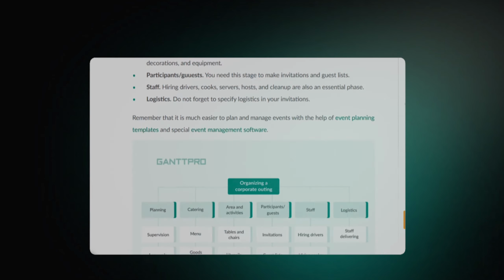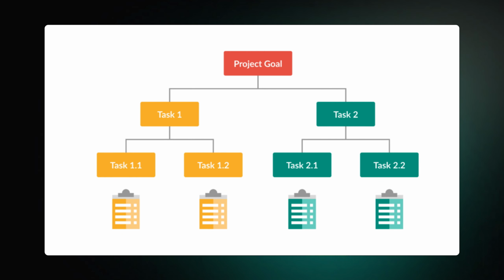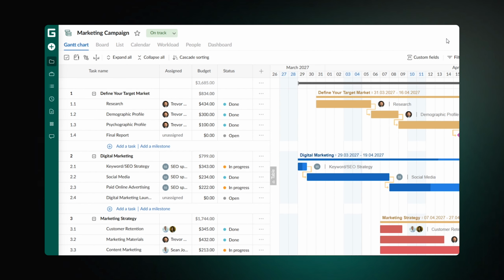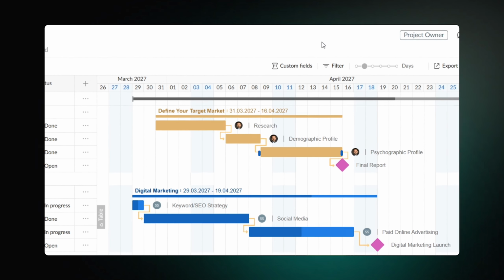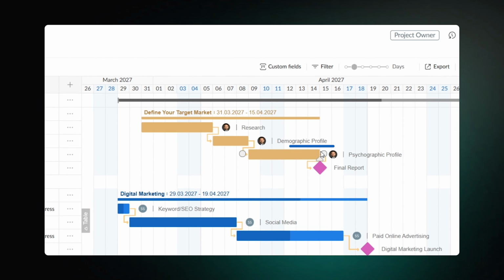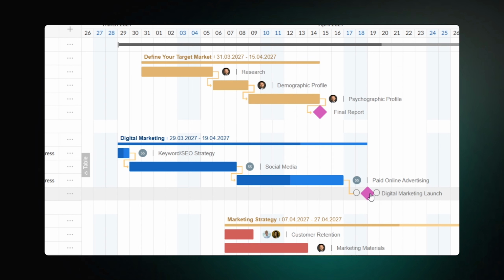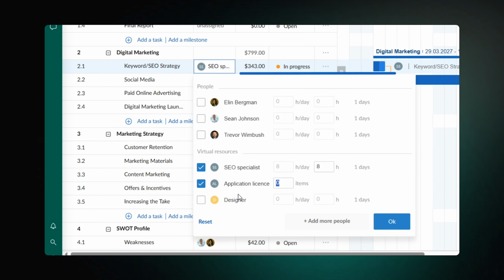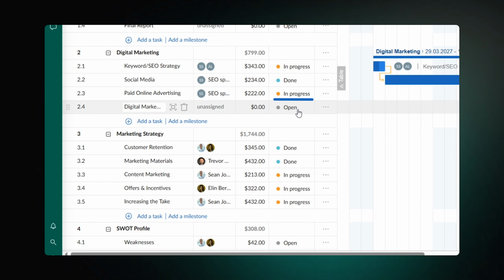However, work breakdown structures can differ, from the simplest hierarchies that only mention the required steps to comprehensive planning systems that contain all the necessary items. A real breakdown system should cover each of the following elements: the start and end date, requirements and milestones, responsibilities, required resources, protocol for quality control, and estimated cost of the project.